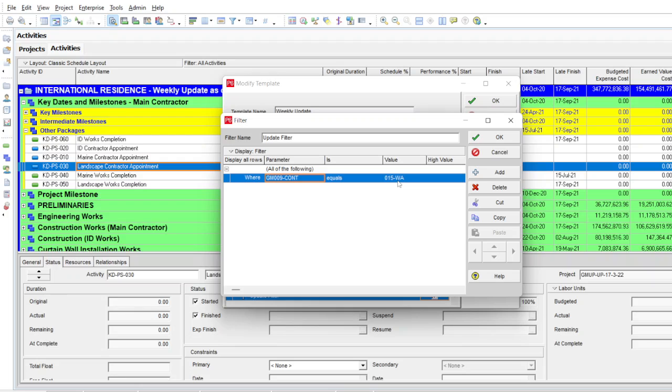So just be sure that in this particular special case, the aluminum program is not a standalone program. We requested them to make their program inside the main program, because we need some updates to check some delay analysis. So they made their revised program inside our main program. So they are always updating in this program. So once we export the update, we export only their part. Just be careful with this one.